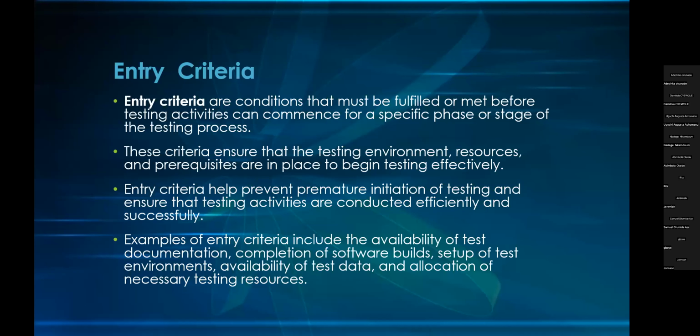Entry criteria specify the conditions that must be met before testing activities can begin for a particular phase or stage of the project, depending on what stage the project is. And these criteria ensure that the testing environment, resources, and prerequisites are adequately prepared to commence testing effectively.